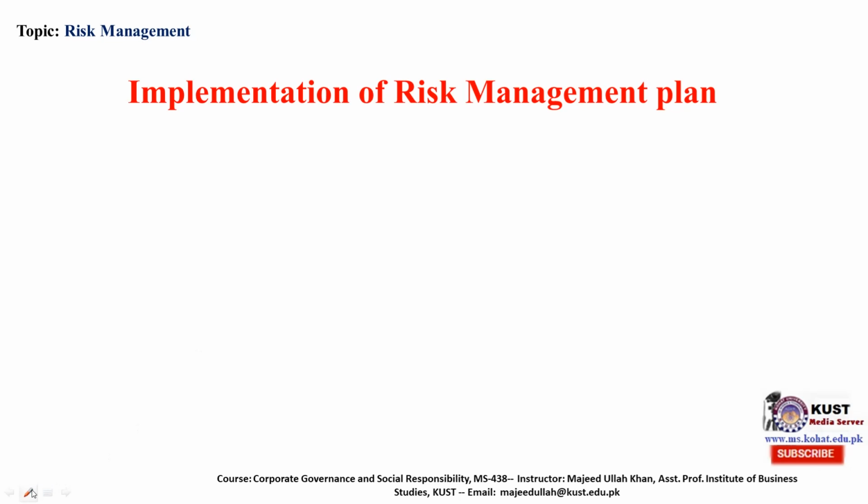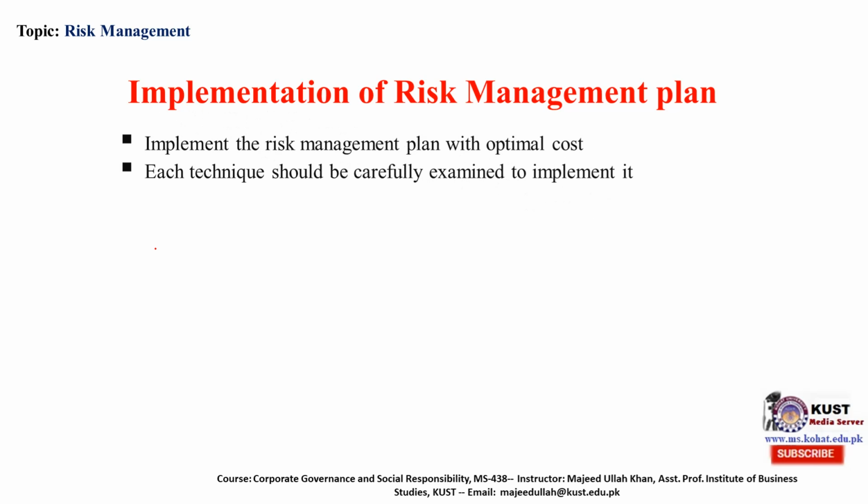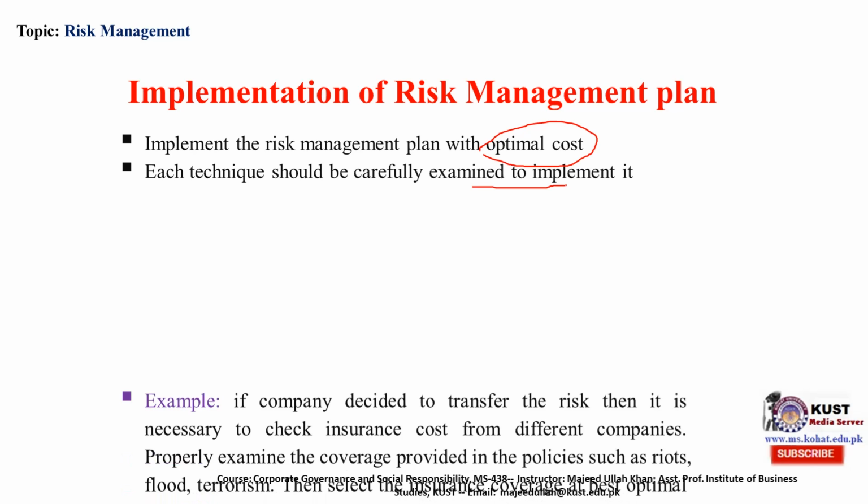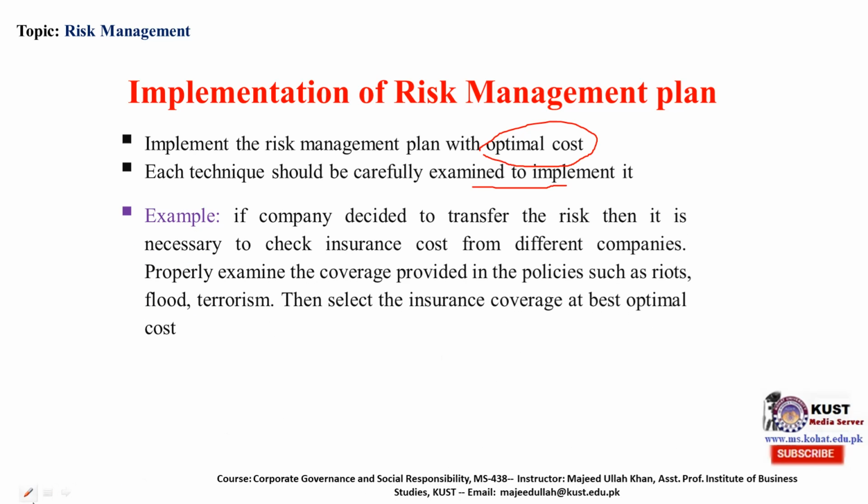Implementation of risk management plan. Implement the risk management plan with optimal cost. If the cost is too high, you should not implement it. Optimal cost is necessary. Let's suppose each technique should be carefully examined before implementing it. Whichever costs you the least, the lowest one should be applied. For example, if a company decided to transfer the risk, then it is necessary to check insurance costs from different companies.